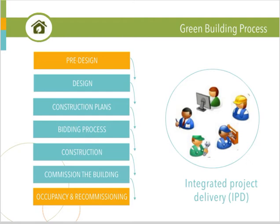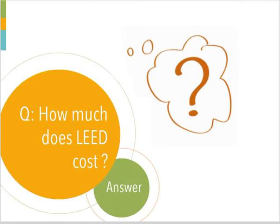The project phases of integrated project delivery, or IPD, are very similar to conventional design, but have the additional stages of pre-design and recommissioning. The stages are: pre-design, design, construction plans, bidding process, construction, and commissioning the building.